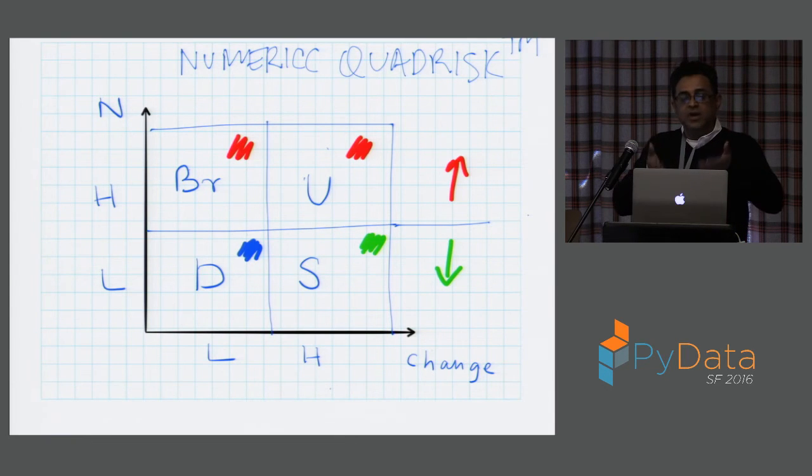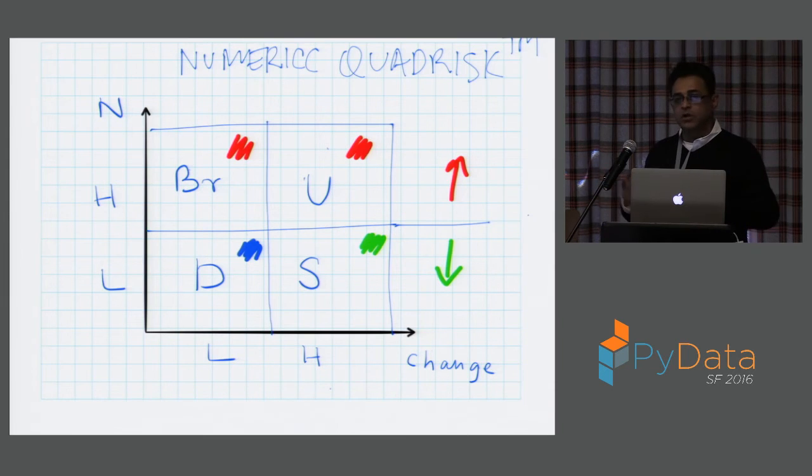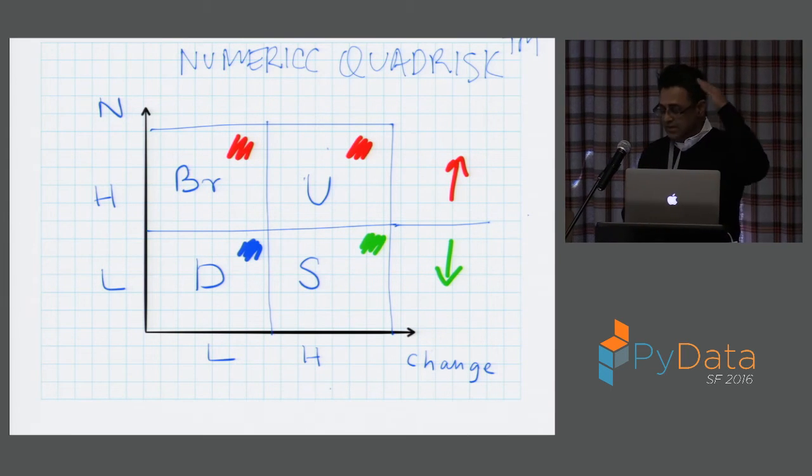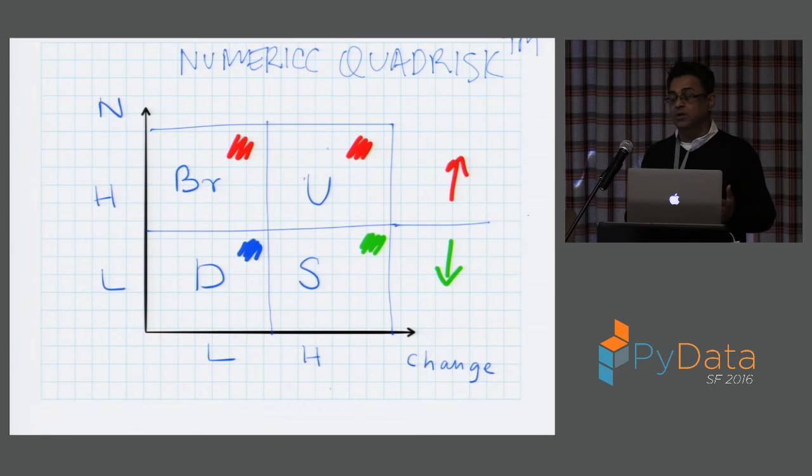And if stuff starts moving up above this line, then your project is moving into a riskier phase for whatever reason. And if that's happening towards release, then that's a problem. It can happen for a period of time when everybody is working on the new features, and then the testing begins, it has to go down, it can't get unstable. And that's a very simple way of thinking about it.